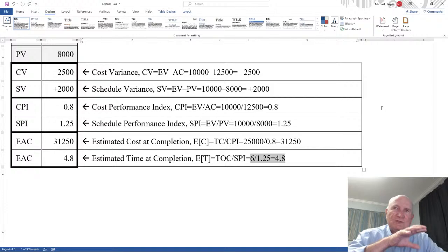If this wing was built 1.2 months early, and we filled it up, how much revenue can we generate from this wing over 1.2 months compared to the marginal cost of accelerating the completion date?"